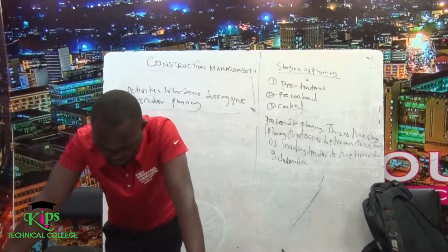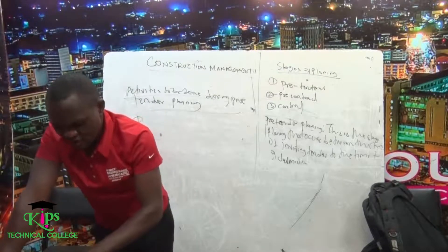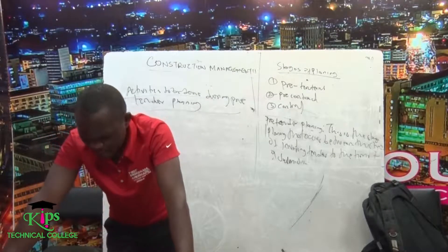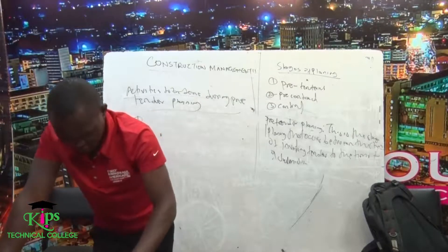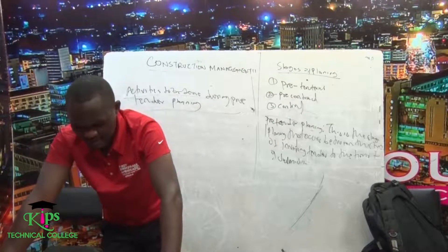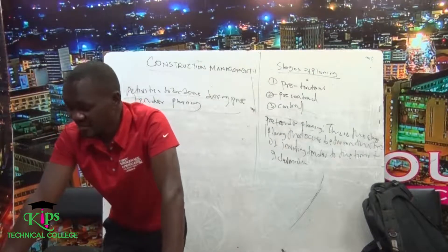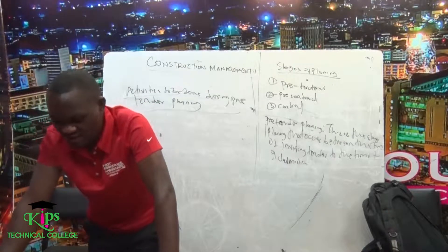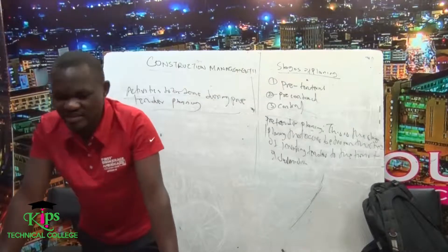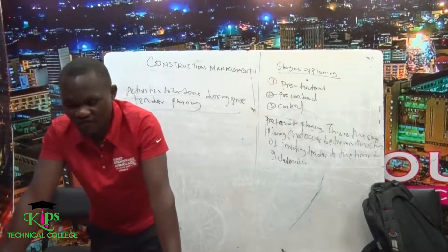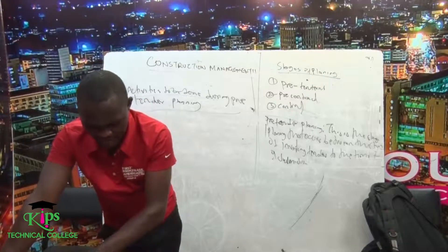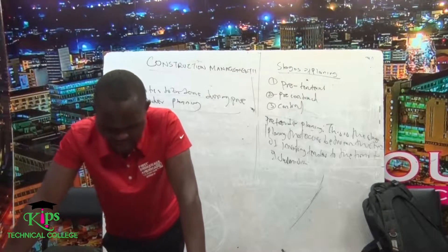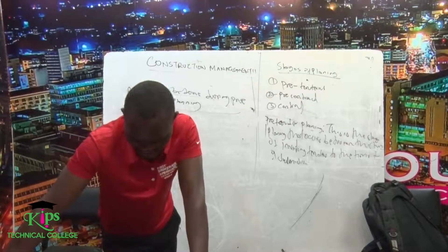When we talk about pre-contract planning, we can have the pre-contract meeting. This is a meeting between the clients and the potential contractor, where they present a good plan for the site. Then again, you can have the site layout planning, the master program, and any other comments.